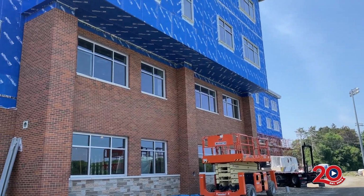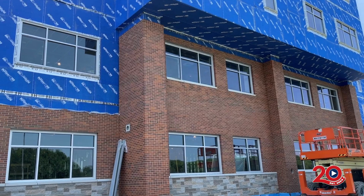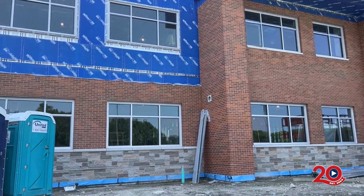As Bethany mentioned, the facade, we're going to continue there. The AVB, the blue skin we can see behind us, that'll be done sometime late July, early August, and then following right behind that will be the curtain wall and the storefront windows, to be complete again end of summer. And the panels, the hardy panels and the solid panels that Bethany mentioned for the rest of the facade will start late summer and continue into the fall. When do you think you'll have the whole place buttoned up? Late fall, early winter.